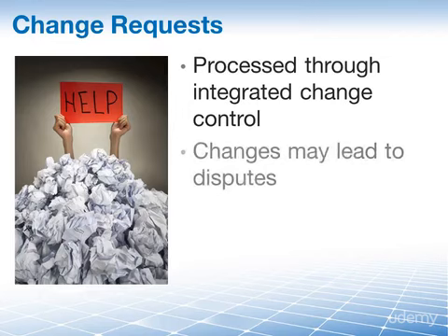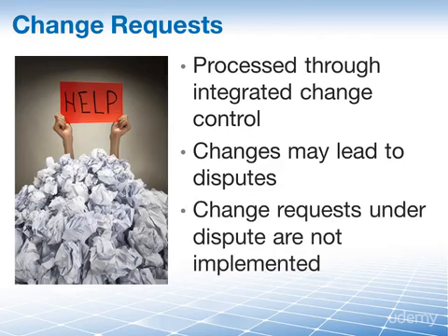In the case where we have a buyer-seller relationship, such changes may later on lead to disputes. This means that all changes must be appropriately documented as well as communicated to the other party. In some cases, this may lead to change requests that did not get implemented because there is a dispute still going on about the change.